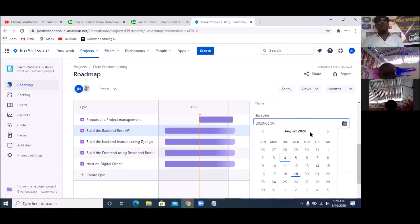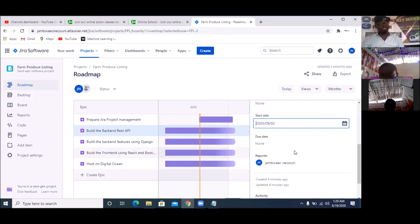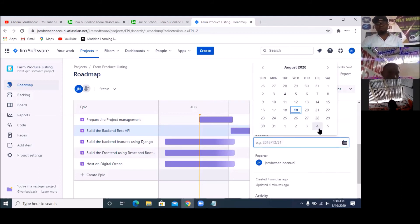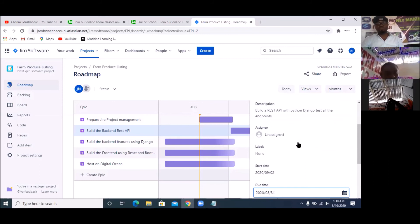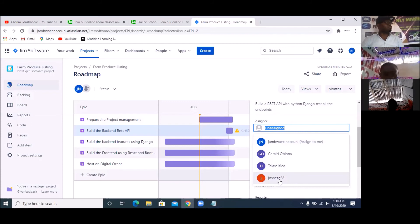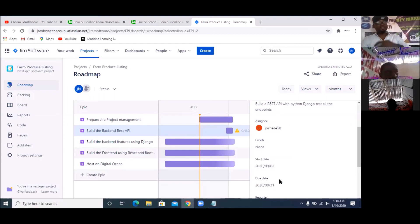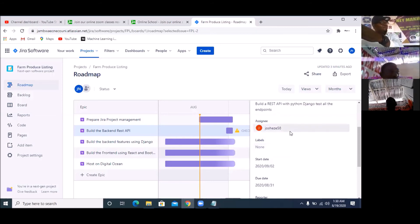When are we starting this one? We are starting it at the end of the other one, so it can move well — the end of the other one is September 2nd. I'm simply going to pick the 1st as the end date — I don't want this to take too long. You are reporting to Jambwaecnecouni. I will now assign this one to Joshua, because Joshua is a programmer. I assigned the first one to Gerard because he is the specification specialist.